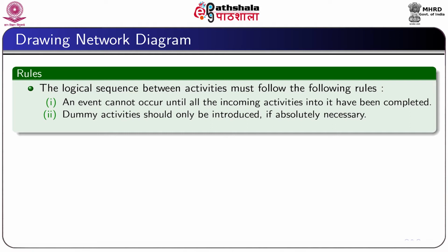We have to maintain the logical sequence or interrelationship between activities by the following rules. An event cannot occur until all the incoming activities into it have been completed. And secondly, the dummy activities should only be introduced if it is absolutely needed.